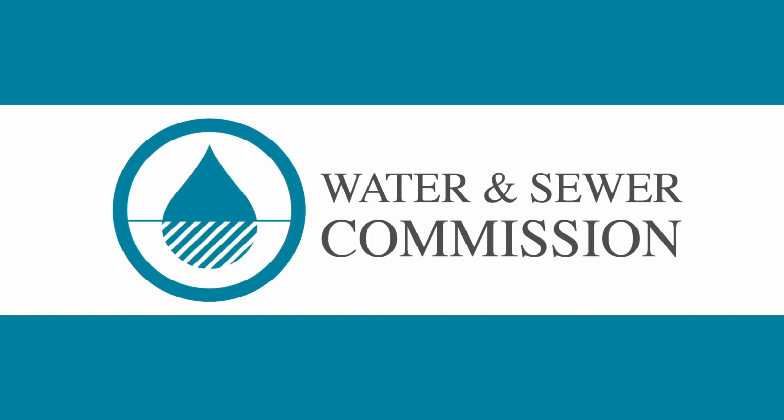Excellent, because you know what I'm asking. If electrical is the last trade that has to be in there, that's cool. It's just if we need to bring plumbing over there. But it sounds like it's pretty well outside stuff. And again, I don't know the final connection from Osterman, but because it's on us as the owner, Frank, if you could touch base with Osterman or take a ride out, you can just make sure it's hard connected to the underground line and to the generator, so that when the electrical work is done, we have no holdups. Because you and I both know every windstorm that happens, I'm like, oh no, I hope we don't need that generator. Exactly. So if you could just touch base and see what that is, and please let me know, I would appreciate that. We'll do that.